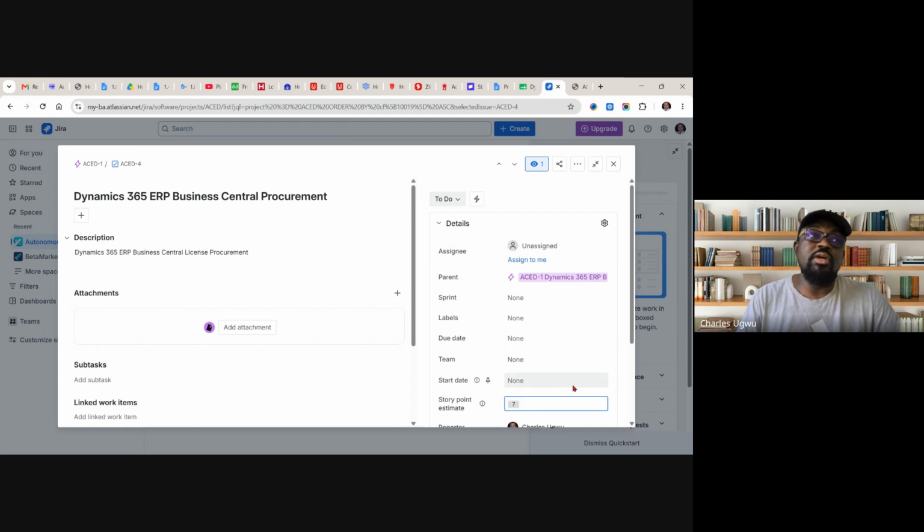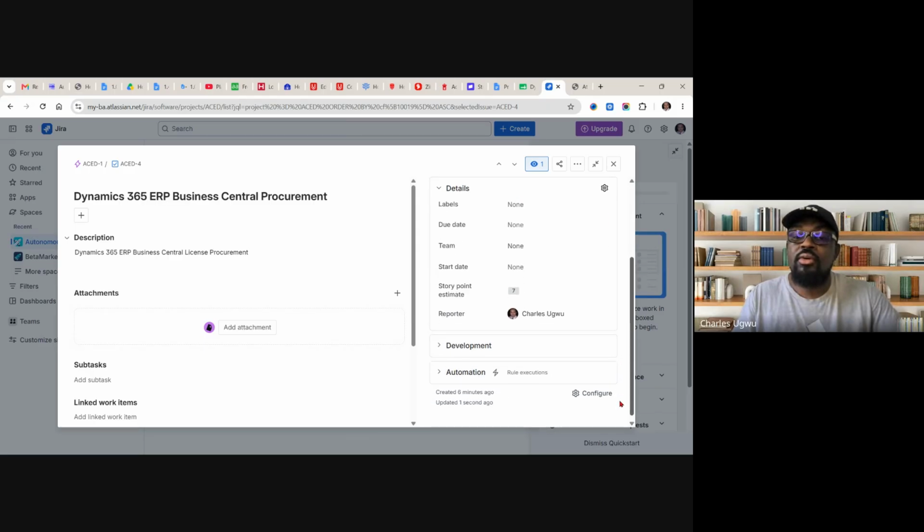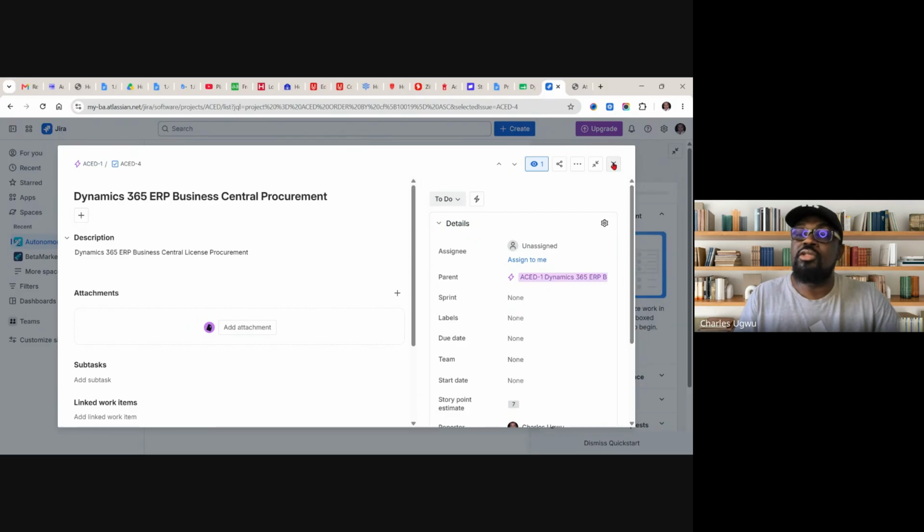What this means is you've carried the whole team along in taking this decision. Everybody agreed that this is the capacity, this is the effort it requires to do this job. So that is the way to get a story point. Let's say we've all agreed that it's going to be 7. Everybody voted and we come with this aggregate, story point 7, and that's it. For now, we can leave it like this. And we'll close it.